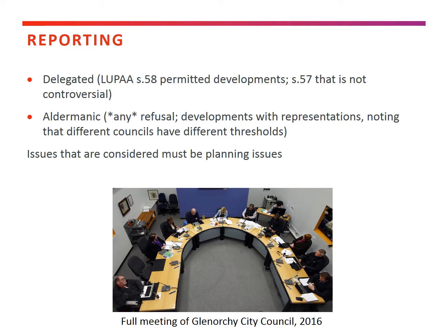So you're writing a report that will be less of a full report than if it's going to Alderman for a decision, because it's pretty straightforward, and perhaps there are no representations, or there's just, in the case of City of Hobart, there needs to be 2 or fewer representations. In the case of Clarence City Council, any representations whatsoever that oppose the development need to go to the Alderman.